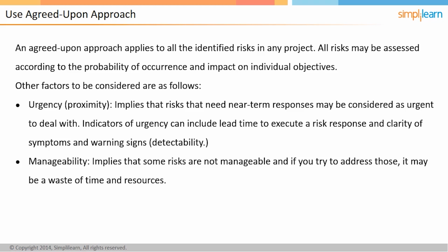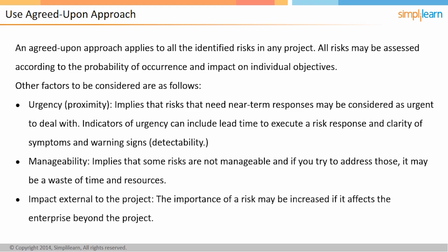Further, the project team may also involve customers and ask for their viewpoint. Also, you need to consider the other factor, which is called impact external to the project. It means that the importance of a risk may be increased if it affects the enterprise beyond the project.